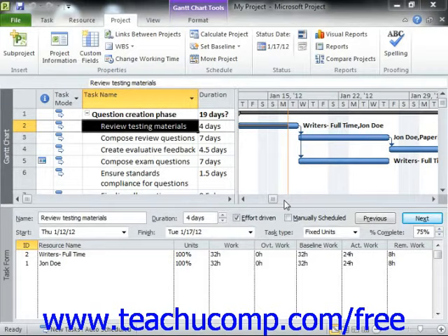For example, if your project file contained a front-loaded task with a duration of 5 days, and you complete 60% of the work on day 1, with the next 4 days completing the additional 10% of the work required, in this case you can individually mark the amount of actual work completed on the task as it occurs to accurately record the work performed. Entering a percentage complete for this type of task may not accurately reflect the actual work performed and could possibly cause Microsoft Project to create scheduling errors when calculating the remainder of the task's duration.